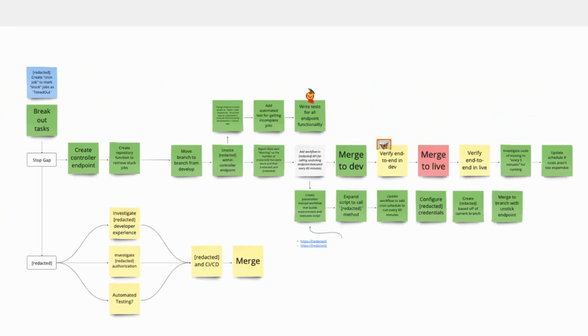When work starts on a valuable increment, the map is empty. The product manager describes several milestones that will demonstrate progress from their perspective. These are user stories. Then the whole team works together to refine those user stories further. The goal is to have user stories that will only take 1 to 2 days to complete, but still represent the product manager's perspective. This can be a challenge, and it's something that I find I have to teach people how to do. Those stories are written on blue stickies.